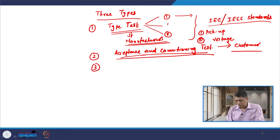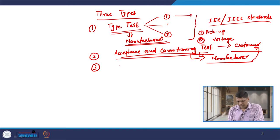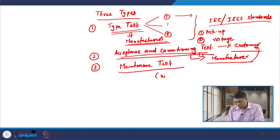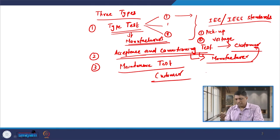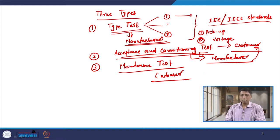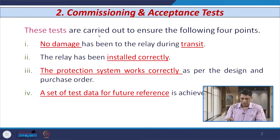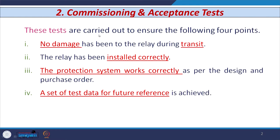This test is to be performed again by the manufacturer, but at the customer premises. The third type is the routine maintenance test, which is to be performed by the customer — that is the periodic test just to check whether the device which is installed is working properly or not. Let us start with the second type, that is the commissioning and acceptance test.